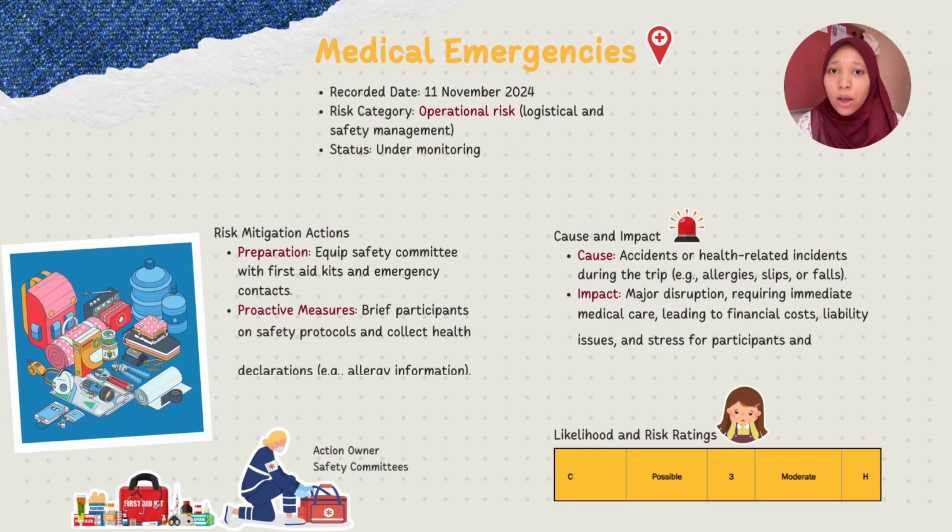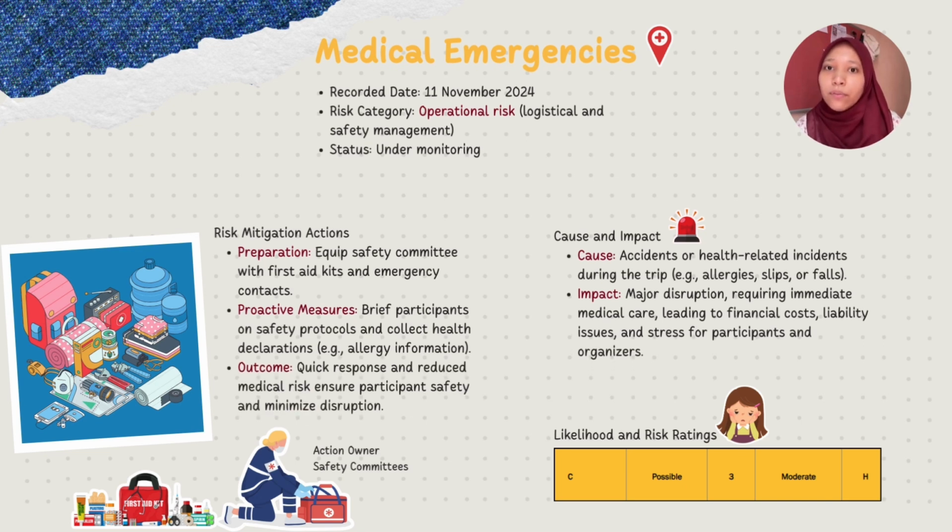Medical emergency. One of the most serious risks we have identified is the possibility of medical emergencies during the trip. This could arise from accidents, health-related issues, or unexpected incidents, posing a significant risk to the safety and well-being of the participants. While the likelihood of such events occurring is moderate, their potential impact is high as they could disrupt the schedule, incur emergency care costs, and also create stress for everyone involved.